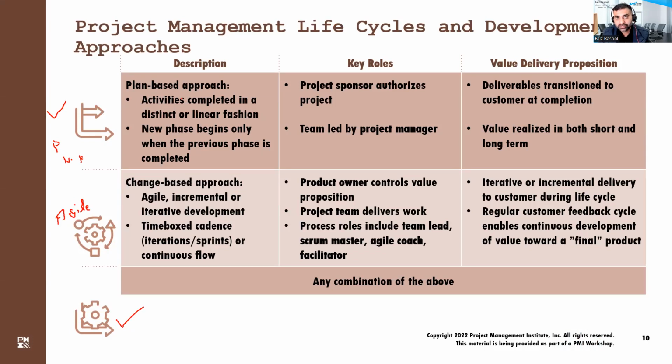The plan approach is, you can think of it, establishing a detailed plan upfront, then following that plan to execute our project activities and monitor and control our project work. On the other side, the agile approach is more of a change-based approach. We really don't develop big upfront plans. We just do just barely good enough planning. We call it JBEG, just barely good enough. We don't do detailed planning at all because we know that there could be changes in the project work and project scope. To cater to those changes, we work in iterations instead of working in a sequence or in serial, phase 1 completed, phase 2 completed, phase 3 completed. No. Instead, we work in iterations and try to complete small items of work. We decompose the big chunk of work into small items.